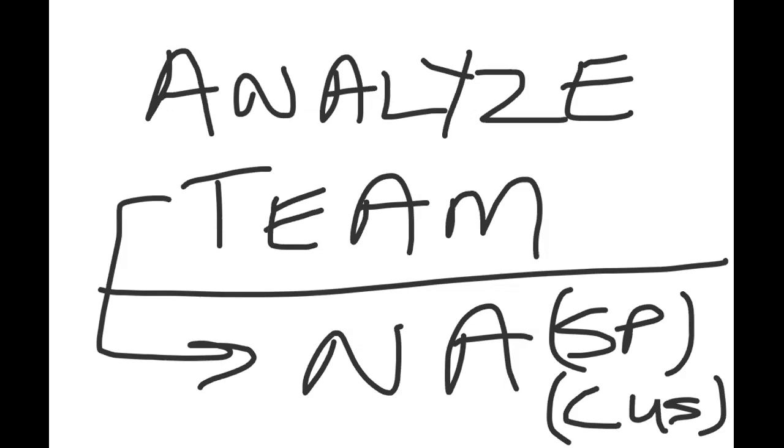You're not always going to have a CCB. They could come from a totally different angle. They could come from an angle of just a PM. But you don't want to lose sight of the steps. And what are the steps? You want to request it in formal writing, get it in formal writing, log it in the change log, analyze it alone or with a team, ask for more information if more information is required, come to a conclusion yourself along with the team, put that into whatever format is needed or agreed upon, send that to the next approving authority. The approving authority is going to review it.